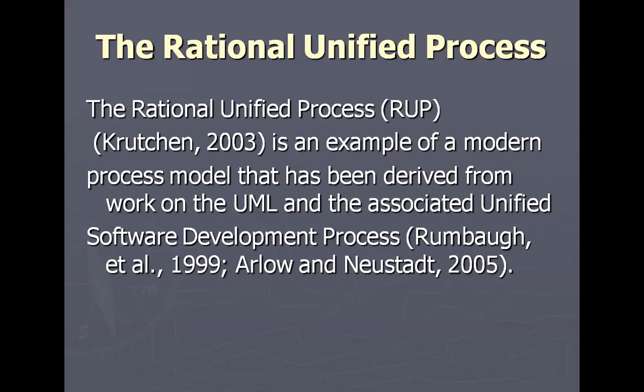It provides several mechanisms such as relatively short-term iterations and well-defined goals, and go or no-go decision points at the end of each phase, to provide management visibility into the development process.